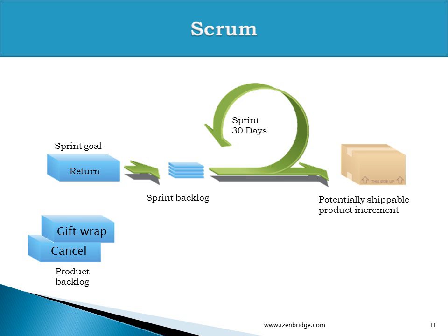It's potentially shippable. The product owner can take a call: is it really going to ship to the end user, or is it for inspection or adaptation and product demo only? It depends. If you are done with your minimum marketable features, you may deploy it to your end customer. If you are not, then you may keep it in your test environment only. But it is potentially shippable, which means that it has all the ingredients which make it deployable to production.